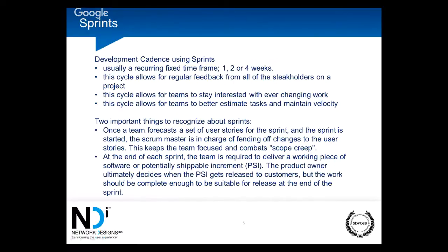So with that 35 hours of production time, I know that I can do that. I've done it before. I do it regularly. So that 35 hours, that 35 points, is my velocity for a sprint. I can regularly accomplish 35 points in 2 weeks. Actually, I guess that would be in a week, right? 40 hours a week. So let's just call it 2 weeks for right now. So 35 hours in 2 weeks, that's going to give you a lot of free time. So now I have my velocity.